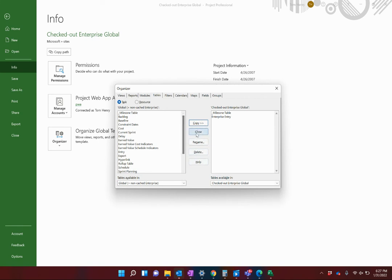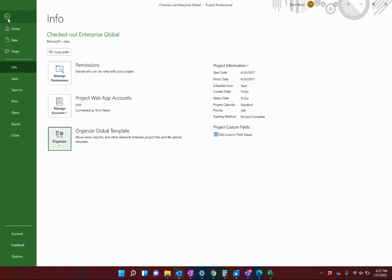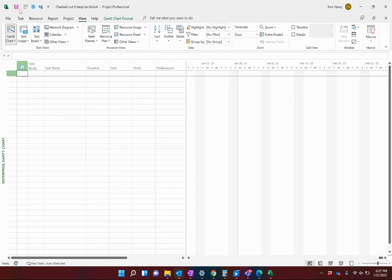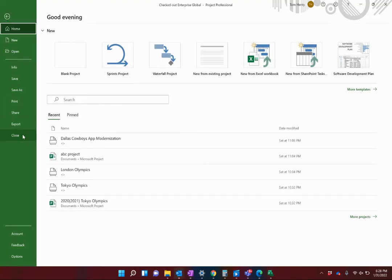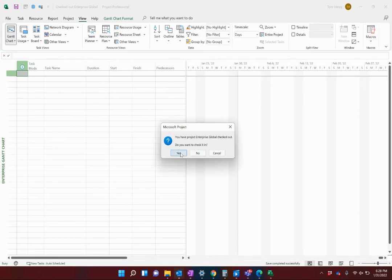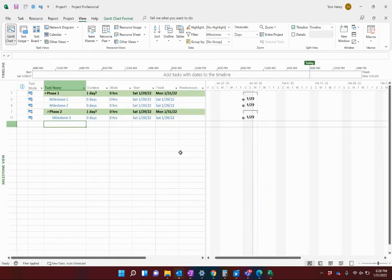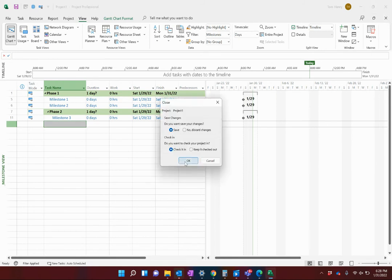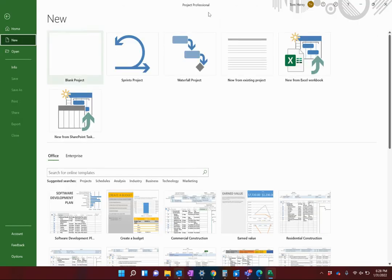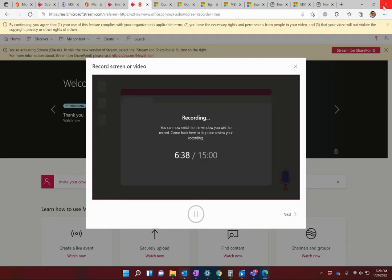That's done. I'll click Close, then save my checked-out Enterprise Global. It saves completely successfully. You don't need to publish — it's not that kind of operation. Close it, and when prompted to check it in, say yes absolutely. To reload the Enterprise Global I need to close out Microsoft Project and reopen it. I'll save that project and check it in, then discard it since I only created it for the purpose of building the view. Now let's close out Microsoft Project.